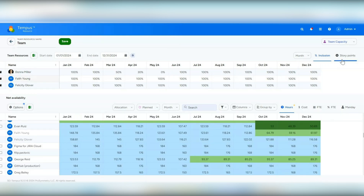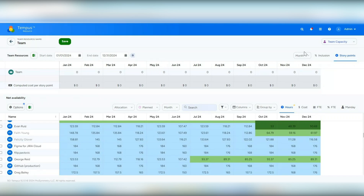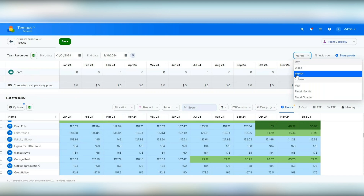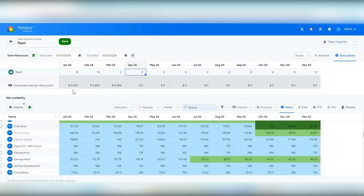The next option is story points, which is new to Tempest and available only for team resources. This is available on this screen and also when you allocate team resources within the single project screen and the bulk project allocation flat grid screen. From here you enter the story point numbers for each month — or at the weekly level if preferred. For example, eight story points in January, ten in February, and five in March. As you enter this information, a computed cost per story point is also shown.